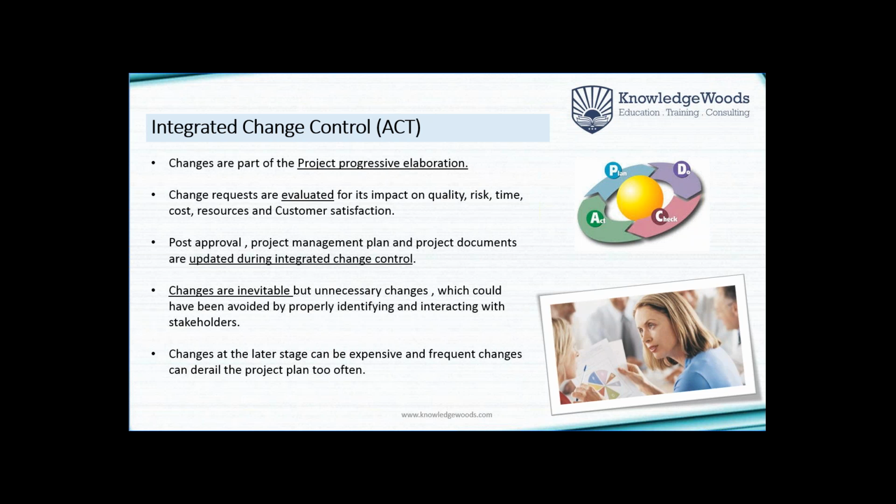Do we need more resources? Is it going to impact customer satisfaction in any way? So change requests are evaluated by the subject matter experts, and this report is given to the change control board, who looks into it and sees whether it is really required to be done, or they may decide that we handle it as a separate project. So they will either approve it or reject it.